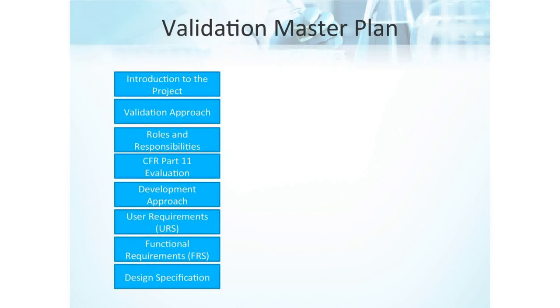Right. And then CFR Part 11 evaluation. Every company will have its own interpretation of how it will manage a process file adhering to this. We discussed that, the CSV. So in this section of the Val Master Plan, it's important to point out to the reader where the documentation that outlines the evaluation criteria declares whether the system is or isn't under the auspices of 21 CFR Part 11.